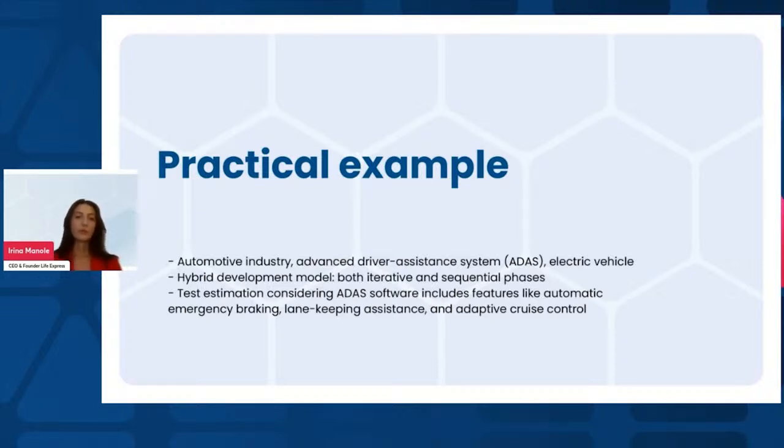Second step would be considering influencing factors over these activities. These influencing factors, you can find them also in the syllabus in subsection 2.2.2. Such factors could be product complexity. The ADAS software is complex and safety critical, requiring thorough testing, thus increasing the testing effort.